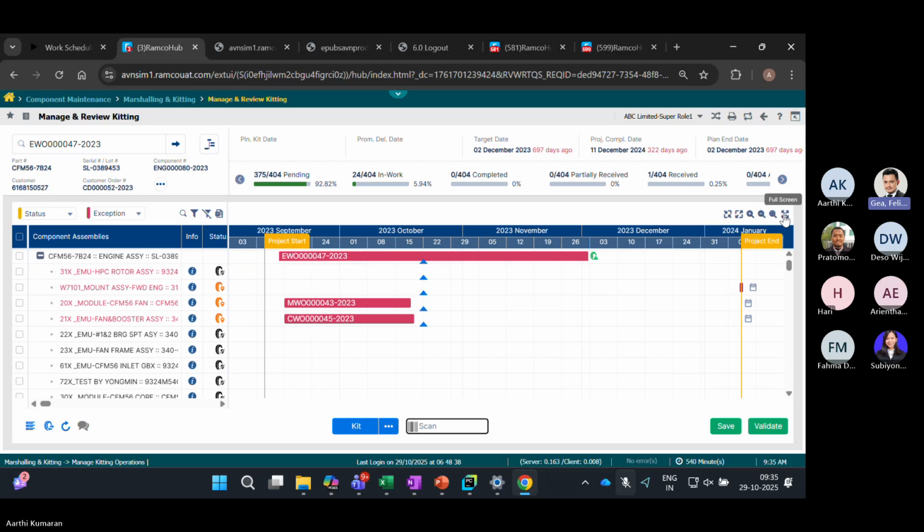You can say, okay, give me all the tasks which are going to assemble in the next 48 hours, and is it ready, etc. So you can just prioritize it. This, if you see, is a pure project management scheme, right? It doesn't just give you the visibility and the Gantt chart, but also helps you mitigate any delays that you're encountering, right?